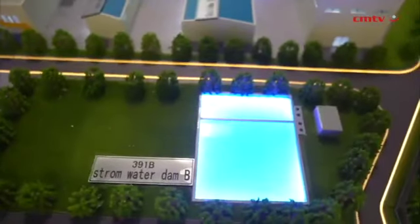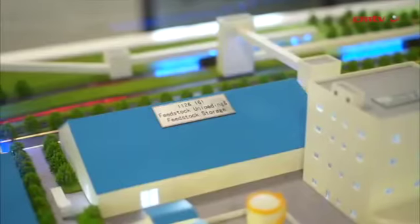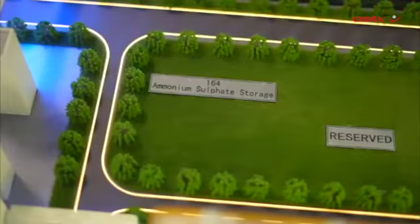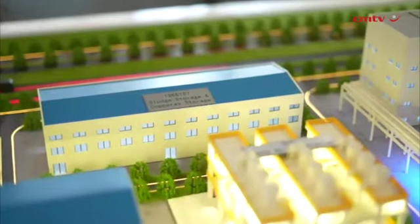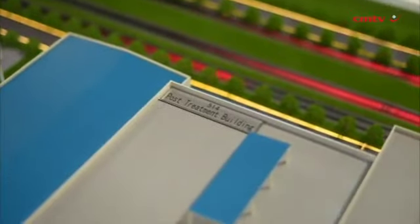And we've got some significant good players. Maybe now is not the appropriate time to mention them, but most people in the project are very well aware of all these DFIs. And if you look at the peak funding with the financing costs and the working capital, it peaks at close to $900 million. So 860 to $900 million, which is quite a significant price tag.